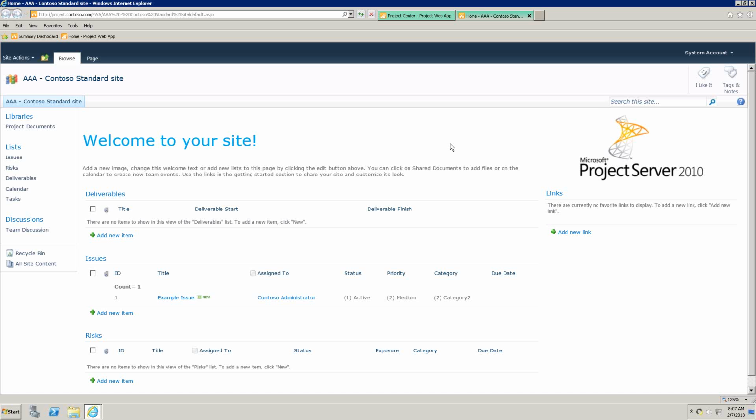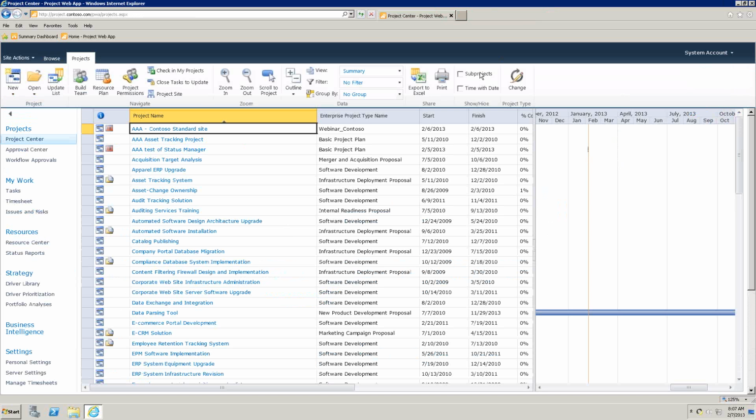But do not ever attempt to take an existing project site template and build from it a new template. It will not work with all the future projects that you associate it with. So you basically have to start from scratch. But I'll show you how to not quite start from scratch as well, if you need to. So how do we create a new site template?